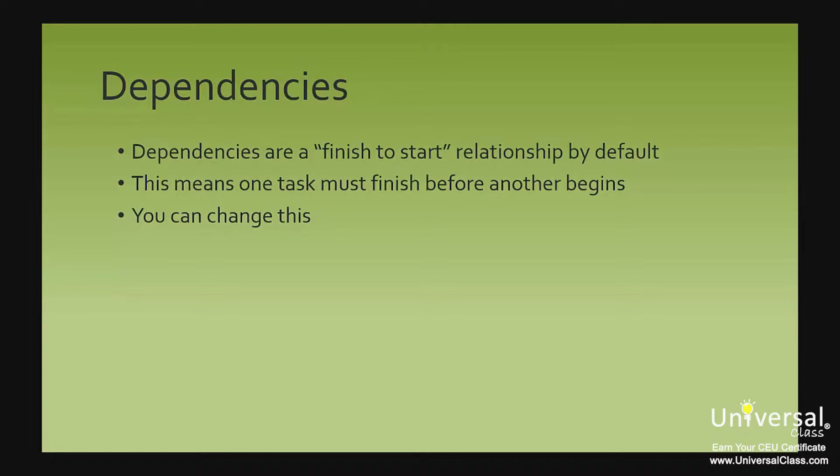If it is not the type that you want, after you create the dependency link, you can edit it to change a type or build in lag or lead time, or essentially time in between a pair of tasks.